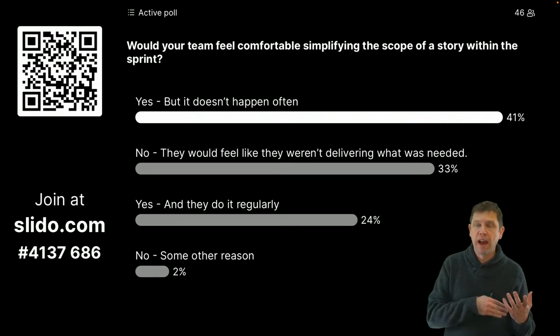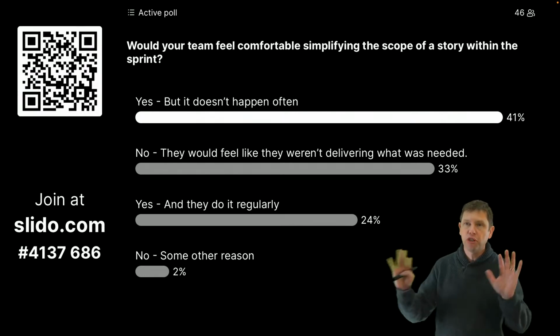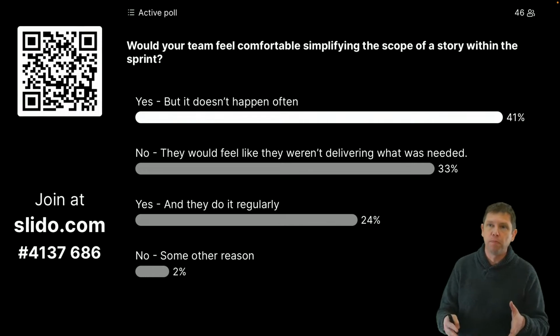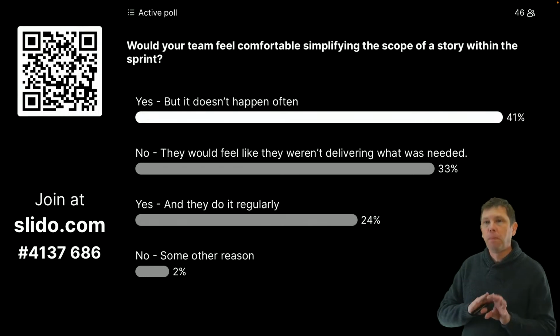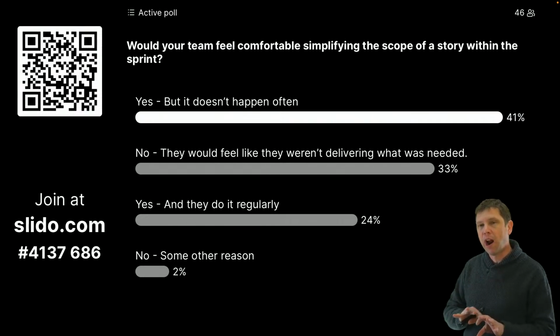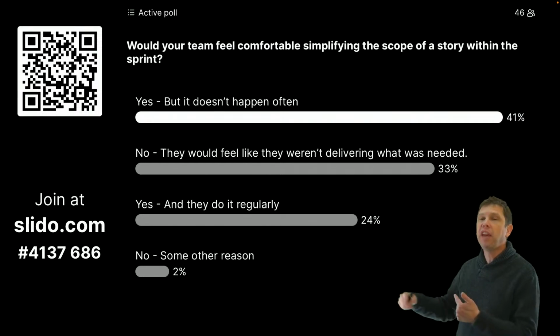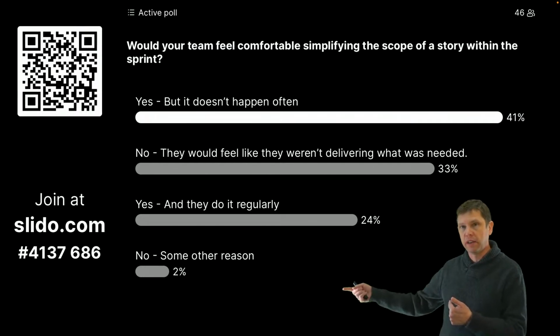If we do the work ahead of time, we no longer have that option. We push the date out by bringing that into scope now. So these types of discussions are what give you the ability to push scope that's not absolutely required out till the very end, so you have the option of going live or waiting until it's done.